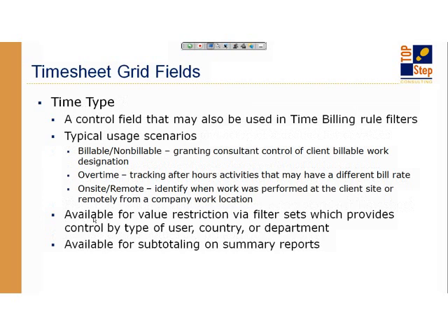Time types. So time types are used quite often. One of the reasons is they're also something that can be controlled through the billing rules. Now, if you're using time billing rules, you may remember that you have filter control by the user, by the task, and by the service of what's being used on the project. But there's also a filter on time type, and time type comes from the timesheets. So in the use of this feature, what I commonly see is people using billable, non-billable as a time type on timesheets.